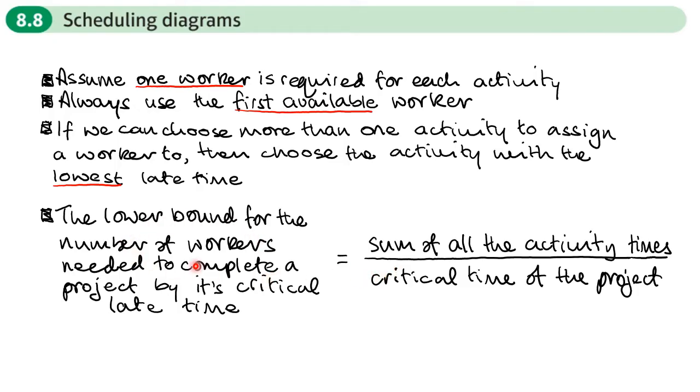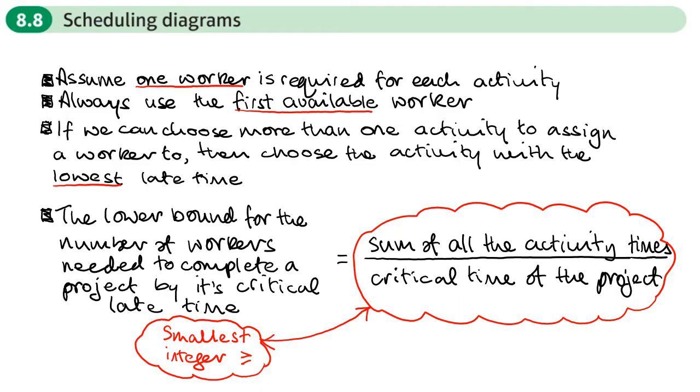The lower bound for the number of workers needed to complete a project by its critical late time is the sum of all the activity times divided by the critical time of the project. When we do this calculation, we may not necessarily get a whole number, but what we want is the smallest integer that's greater than or equal to this value.